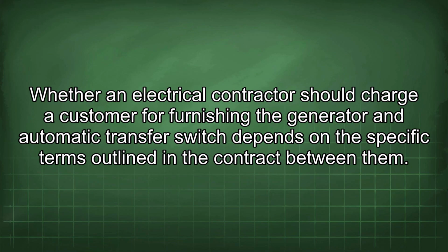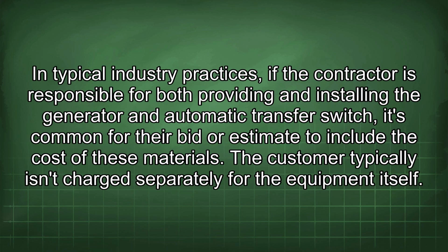Whether an electrical contractor should charge a customer for furnishing the generator and automatic transfer switch depends on the specific terms outlined in the contract between them. In typical industry practices, if the contractor is responsible for both providing and installing the generator and automatic transfer switch, it's common for the bid or estimate to include the cost of these materials. The customer typically isn't charged separately for the equipment itself.